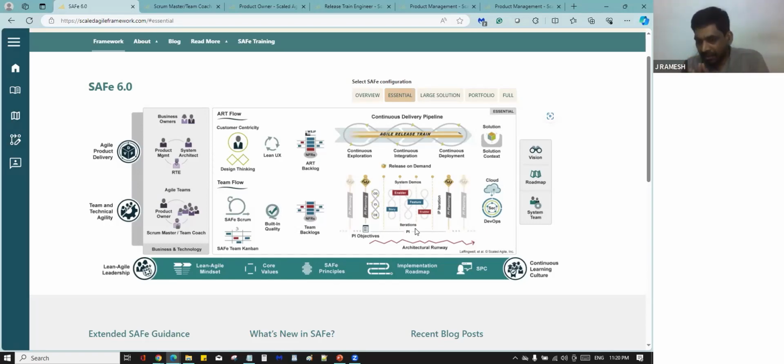That's the reason, my dear friend, the number of cadence, the number of ceremonies is based upon the team. This is decided by the total team members in the beginning of each and every PI planning. Some cadence start at the same time. Some cadence end at the same time. A 2 week sprint means 2 week sprint throughout the project. A 3 week sprint throughout the project.